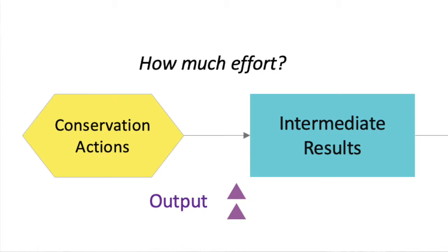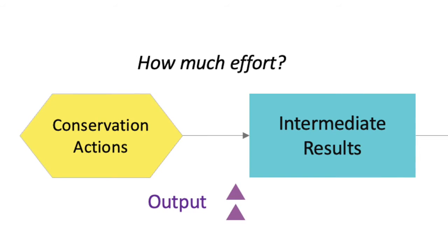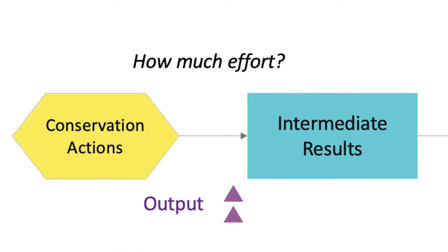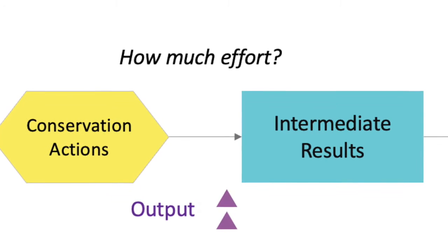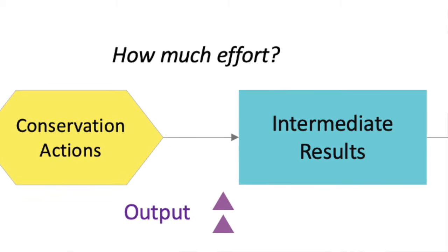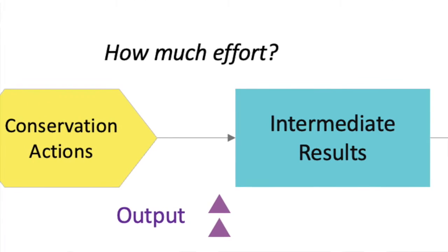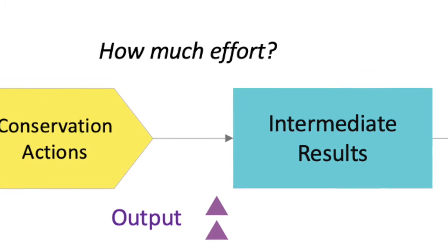We typically try to ask 3 questions of how things are going. The first is fairly basic, but it's, are we actually implementing the plan? Are we doing what we said we would do? And so to check on this, we look at progress reports and the data for our output indicators. We really want to know, are we getting done what we thought? And this will tell us whether we're broadly on track, or maybe we're not on track. Maybe things aren't going quite to plan.